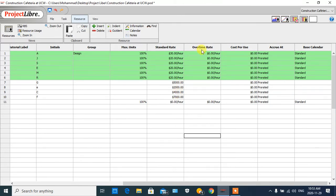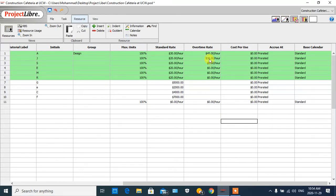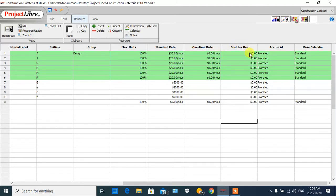We also have another parameter called 'Overtime Rate.' If our personnel work more than the defined hours — for example, all of them are full-time, so if they work more than eight hours — we should pay the overtime rate. For example, we pay $45 for the first person and $30 per hour for another. For this project, we do not have overtime. Another option is 'Cost Per Use.'